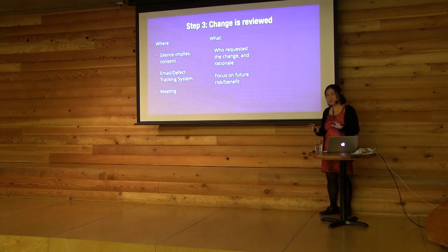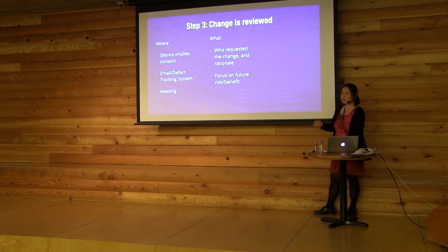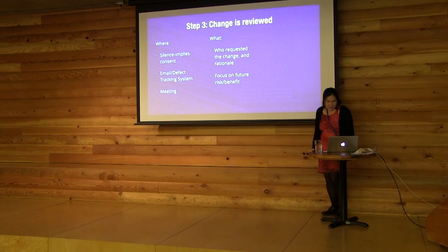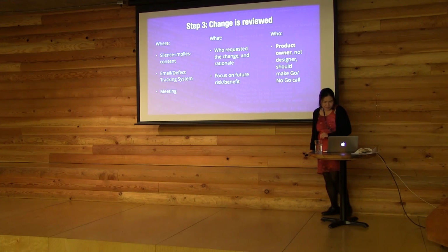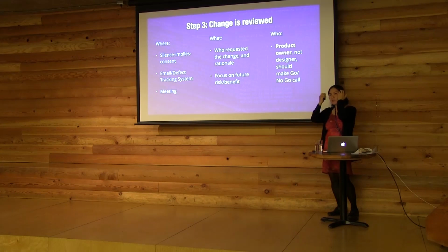But what we need to decide in order to choose to accept or reject a change is really a simple question: will the company make more money if I make this change or not? And then, I'm a big fan of having the product owner make a go or no-go call in consultation with everyone who's affected. Change can be really political, especially later in the process, and especially if people are really sick of something changing.